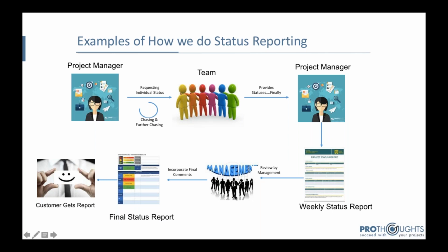And if I take $100 per hour as the burden rate of the resource, it comes to around $2,000 per week to create a stale report. That's pretty expensive, isn't it? In Indian rupees, $2,000 is 1.5 lakh rupees, 1 lakh 50,000 rupees. And if there are 4 weeks in a month, it's like 6 lakh rupees to create 4 reports. I don't think it's valuable enough. So I call it muda, the waste, of doing things.